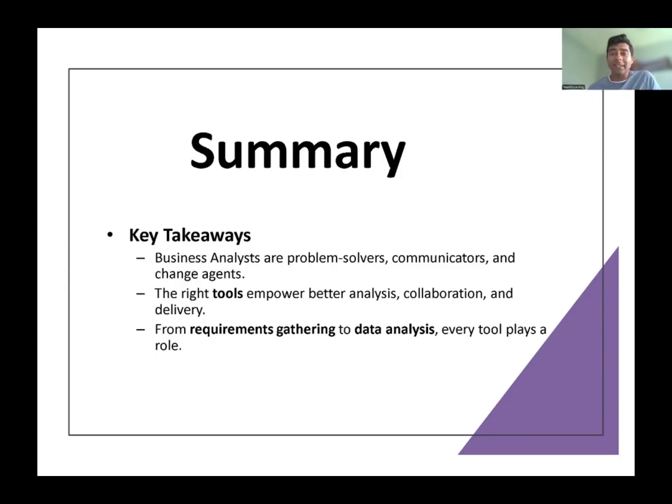Again, these meetings happen on a weekly basis, or bi-weekly basis. So when you bring it into the grooming call, a week has already happened, and people don't remember what you talked about, so you will again discuss the user story on a high level, and then you will story point your user story. Once the story pointing is done, then this user story goes to the product backlog or the sprint backlog, and it sits over there.